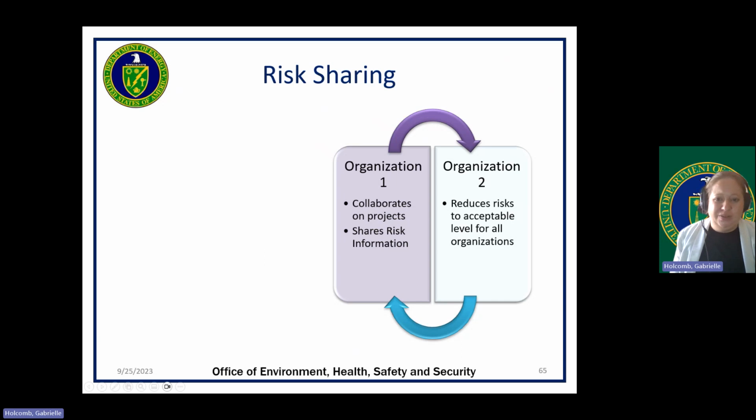So, what's the difference between risk sharing and risk transference? Risk transference is the strategy of financing your risk by shifting the responsibility and loss to another person or organization for a price, usually conducted through a contract of some sort. Whereas risk sharing is dividing risks between two or more individuals or organizations.